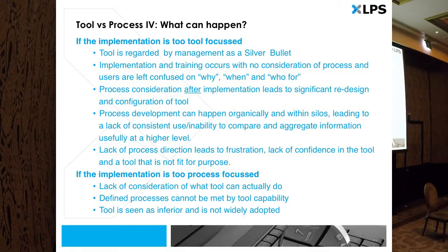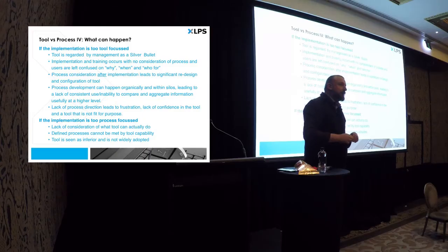I'll just draw your attention to the third bullet point, and it's something we're encountering specifically in the work we're doing at the moment. Because the tool was initially implemented in a one-size-fits-all approach, we're now having to do significant rework in what was originally implemented to try and match the different elements and different PMOs that need to actually use it. So you can't be all things to everybody. You need to have a layer of consistency, but also enough flexibility to provide people within different areas who use the tool quite differently to be able to do what they need to do.